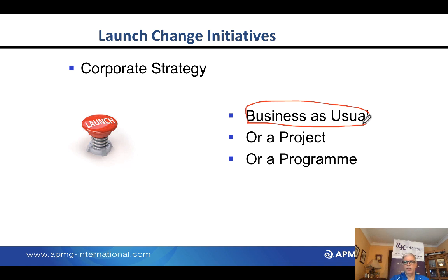However, if this initiative involves two or three business areas, then we would need to manage it as a project, because each department has its own section head. In a project, there is only one section head, and therefore it's important we clearly establish who that individual is. And a program is when an initiative is going to target multiple business areas.